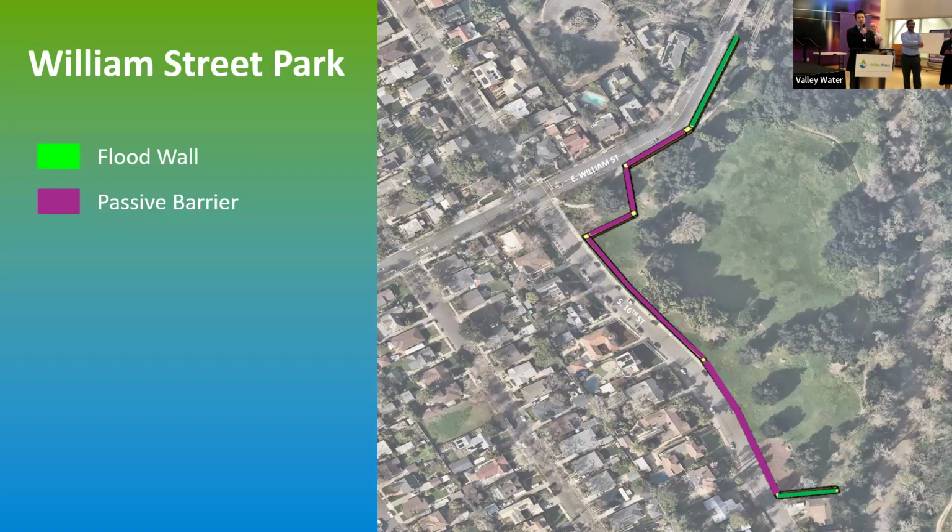So for phase 1, where we've had trees that are not removed, but they've been impacted through pruning because of the construction equipment, we've had to prune, or because the roots also go out very wide. And so we're doing a 3-year tree root monitoring. And that's also required by the California Department of Fish and Wildlife. And so our biologist is monitoring them for 3 years.